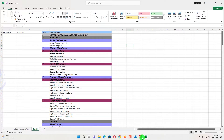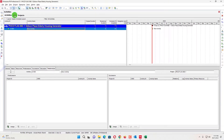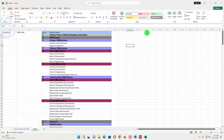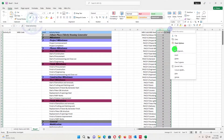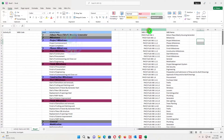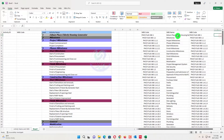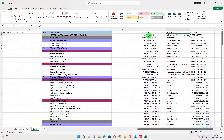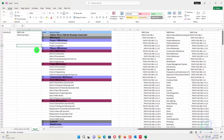From Primavera P6, I will go into WBS, press Ctrl+A, Ctrl+C, and paste there. You can see all the WBS have been pasted. I will copy this column and paste it in front of the activities. Now you can see the WBS names and their codes. I need to import all these codes — this WBS name has this WBS code — and I will assign them.